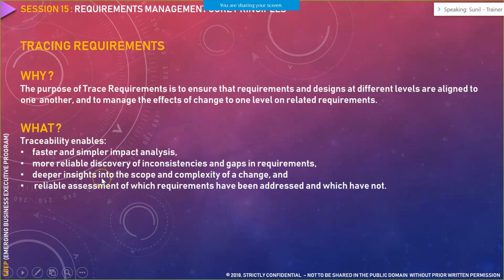Then comes deeper insights into the scope and complexity of the change. Whenever a change comes to you, or a CR comes to you, you need to first identify its complexity and the depth of that particular change, whether it's small, medium, large, extra large, or what is the complexity or size of that change, whether it's easy, whether it's hard, whether it's difficult. How do you identify it? You identify it with the help of tracing that particular requirement, what all areas it is impacting.